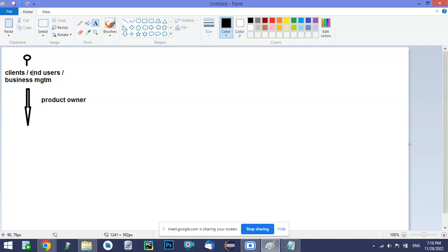And whatever requirements are given by the end users, he will make them simple, clear and not diplomatic, smaller and clean, understandable requirements for the development team. Because as an end user, you will simply say that you want an application like Flipkart, but what exactly to develop in Flipkart, that segregation is done by the product owner. That stack is what we call the product backlog.